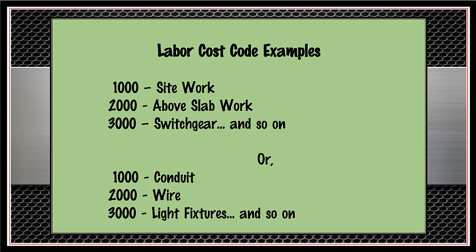If losses are experienced at the selected installation rate, instead of adjusting the labor to cover the losses on the next estimate, it is common to see companies start hiding money in other areas of the estimate in order to compensate for the losses in labor. For example, they may bolster material costs, equipment rental costs, or simply increase margins overall. Over time, they learn that if they choose labor column 2 and then overprice their material by 20%, they usually land projects and make money.